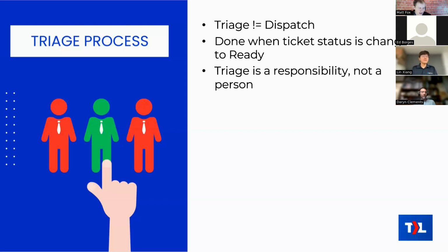So by the way, as far as agile workflows go, your triage might not need to change too much. If you already have a really good triage process, you're going to keep that. It'll just slot into the whole workflow a little bit differently, but generally speaking, all the things that you do in your good triage process, you're going to keep doing. In particular, we want to make sure that certain fields on the ticket are set. Obvious ones are the company and the contact. You want to make sure that the agreement is set. Other ones would be the priority and the SLA coming from the priority.